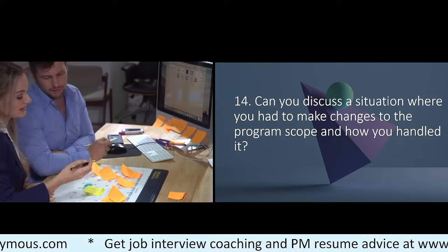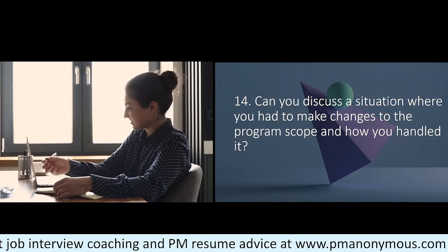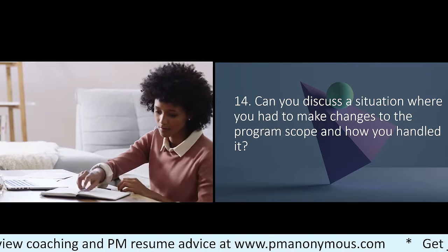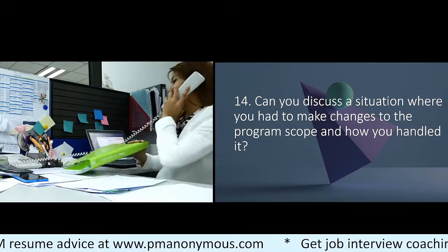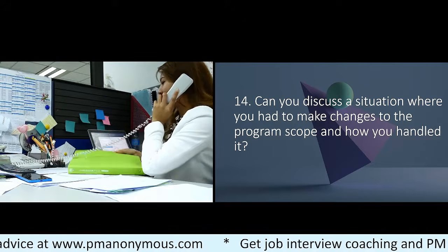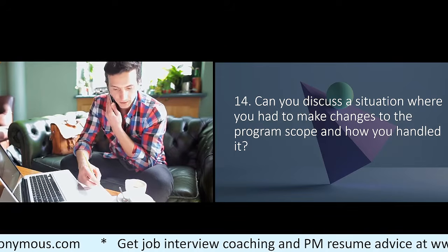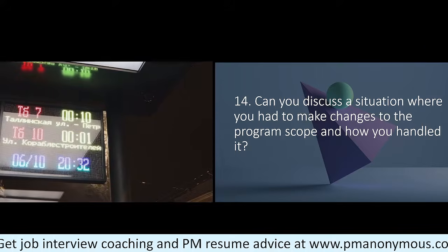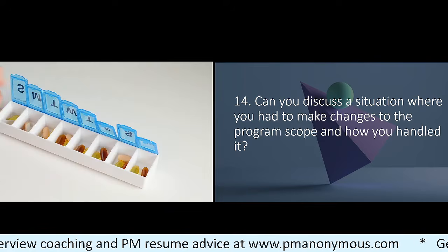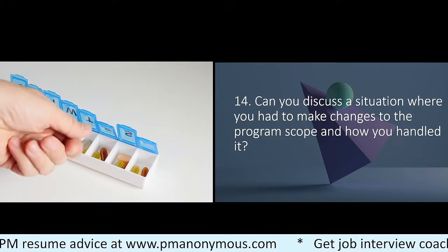Making changes to the scope was very important, but it was not done irresponsibly. It was done using an intentional approach by first of all documenting the requirements in our requirements traceability matrix across the entire program, and then running test scripts, use cases, and understanding what exactly we had to do and test to get our stakeholders to be happy.